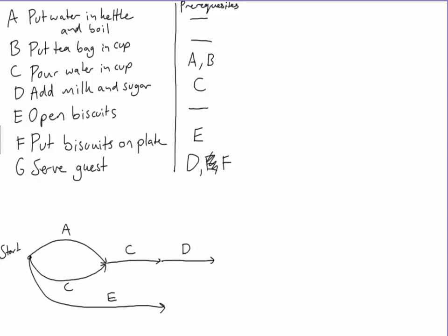Now, D and F both are required for serving the guest, which is G. So F is going to have to come up to join that one. And then we've got G across here. And that leads us to a finish point. Okay, so that's how I would draw a precedence network.